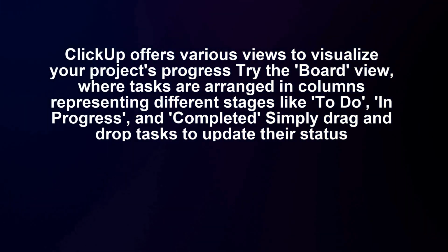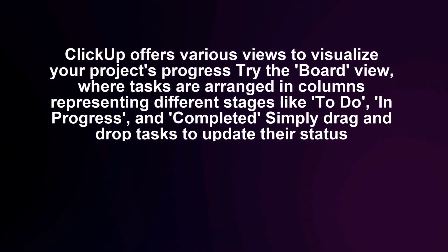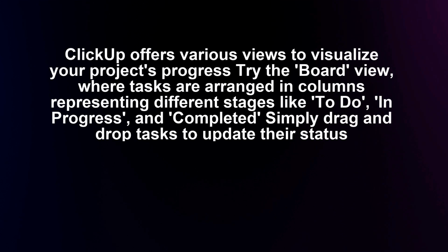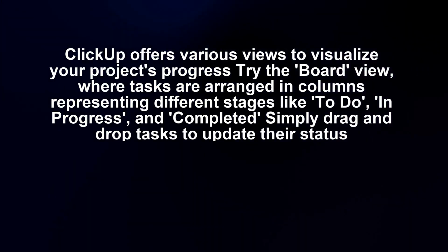ClickUp offers various views to visualize your project's progress. Try the board view, where tasks are arranged in columns representing different stages like to do, in progress, and completed. Simply drag and drop tasks to update their status.